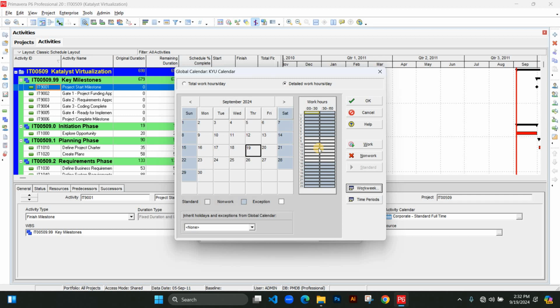Now, remember, we're going to be having some activities that are taking, let's say, 1 day or 2 days. So in your calendar, if you don't remove those days, you may find that a certain activity is lacking on it, and you did show that there will not be work going on. So you have to remove all those public holidays. And this is how you do it.